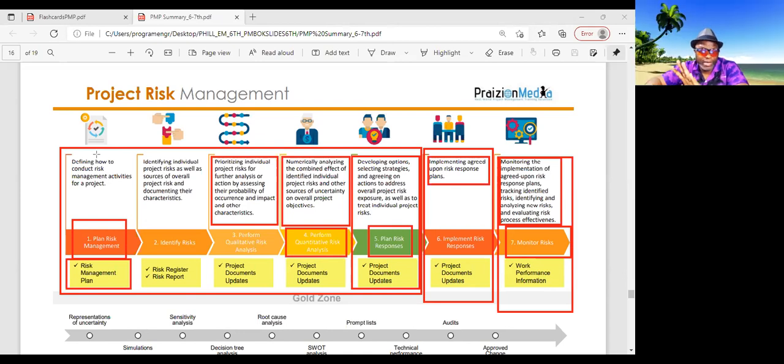And there are 4 types of change requests you could have: corrective action, preventive action, defect repair, or updates. And all of these, you need to be familiar with them. They're all in 4.3 in direct to manage project work. As an output, you get change request.